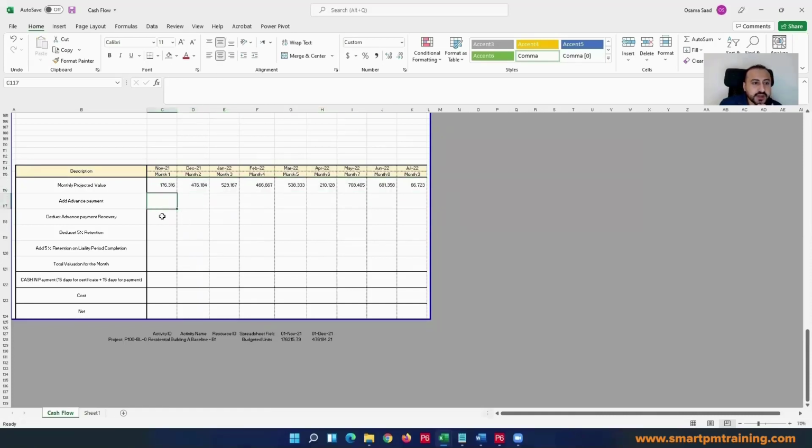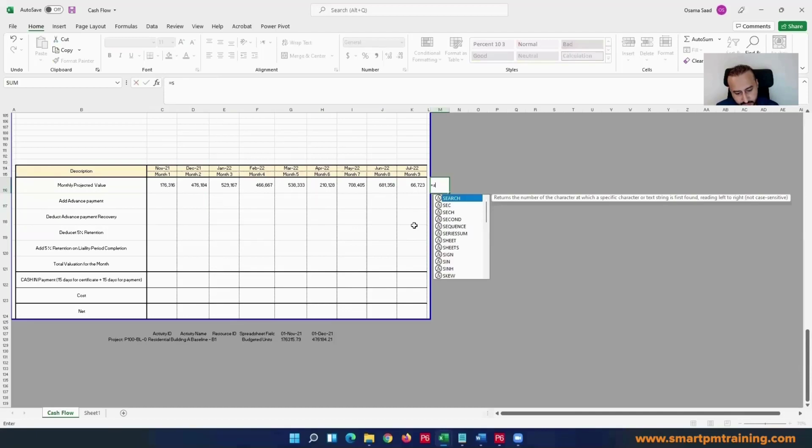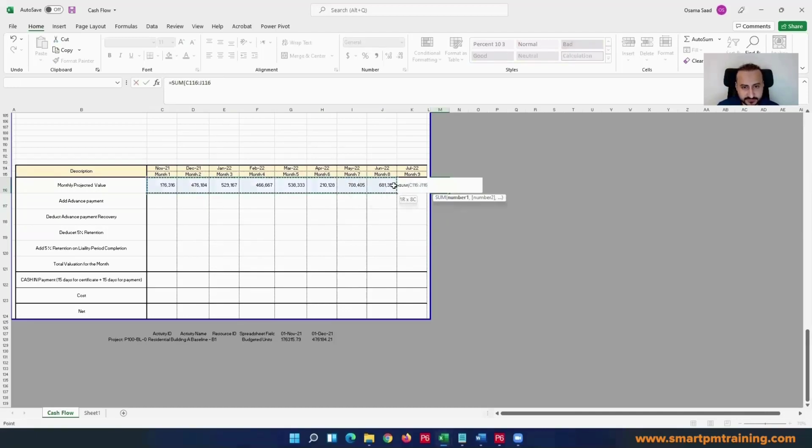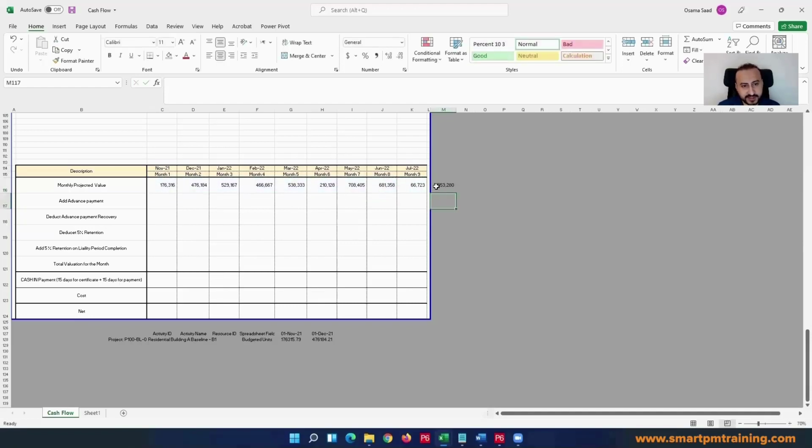Okay. And what is my advance payment? Typically, it's 10%, right? So if the sum here is my total value, because the sum should match the contract value, and my advance payment, I can receive it on day 1 or like from month 1, right? 0.1, a formula. So this value is my advance payment.